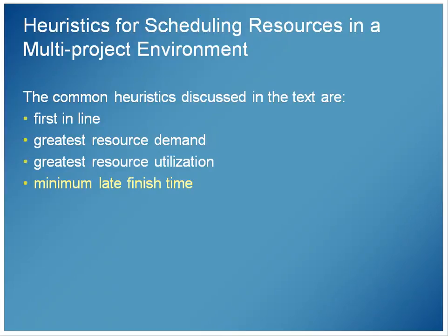The danger is that resource starvation occurs against projects that seem to have a lot of slack. Again, a good project that has some slack in it is biased against with this approach, just like the greatest resource heuristics bias against good projects that don't need a lot of resources. Now, I've said all this stuff about heuristics, and this is the last slide, so we're done after this.